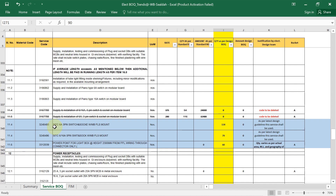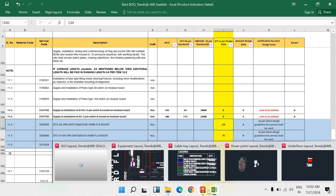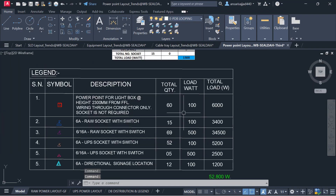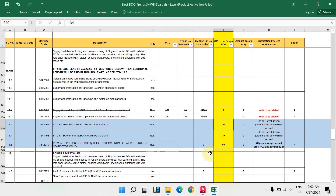Supply, installation, testing and commissioning of 6-amp 3-pin switch and socket — write down their quantity. Then 16-amp 5-pin switch and socket quantity. Also, power point for light box: in our project we have calculated 60 power points total, so I have written quantity 60.